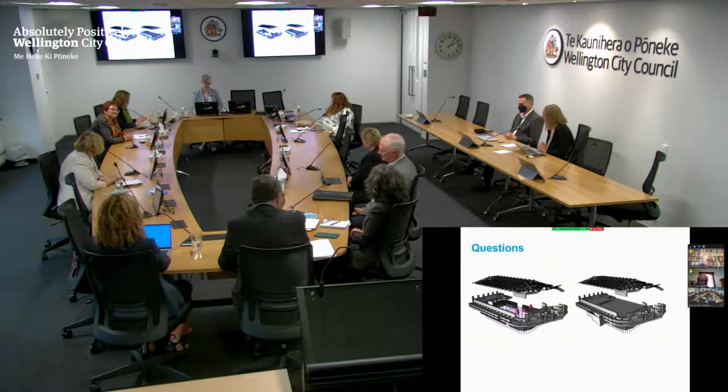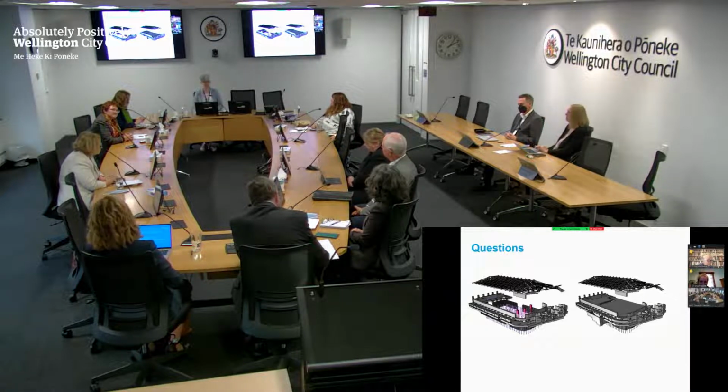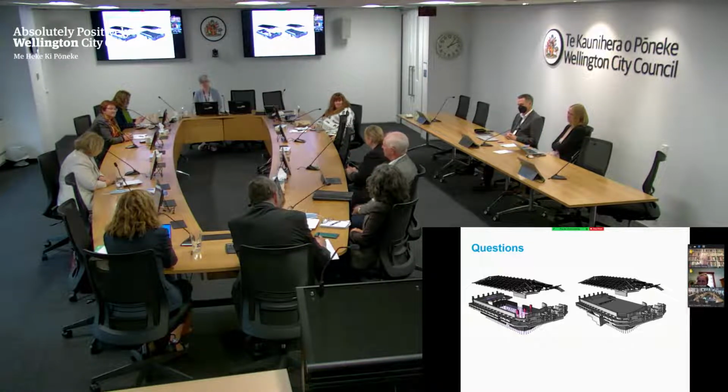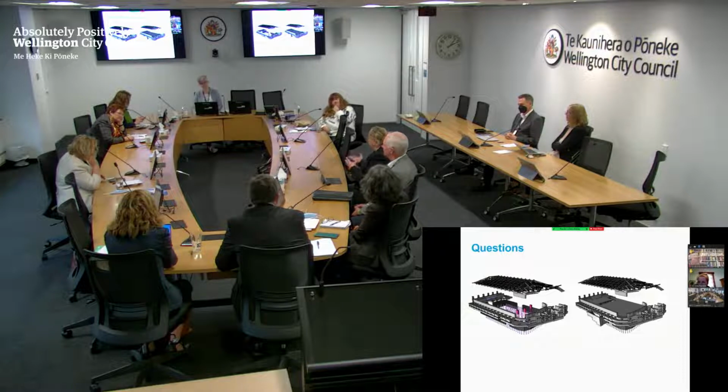Lara, I guess your independent view is, have we dropped the ball here? If we'd performed better, and we being either councillors or staff or our contractors, could these costs have been avoided? Look, as you may have heard, we undertook some work at the very beginning of this project, and at that time it was recognised there was a great deal of uncertainty. It is a very complex project. That hasn't changed. We also undertook a project health check in the middle of last year, and for context, a project health check is not a diagnostic tool to find fault or illness. It's there to verify the current project status and look for opportunities on the go forward if there's any way to improve outcomes on the project.